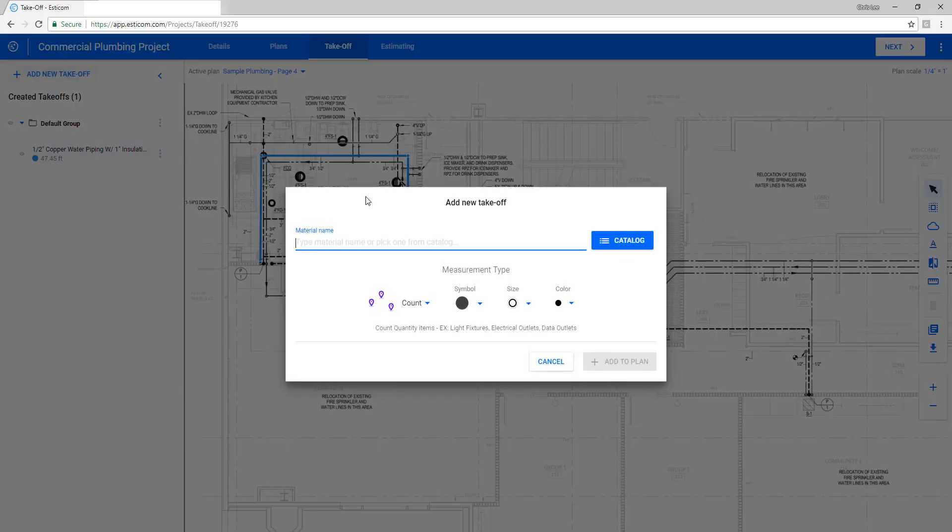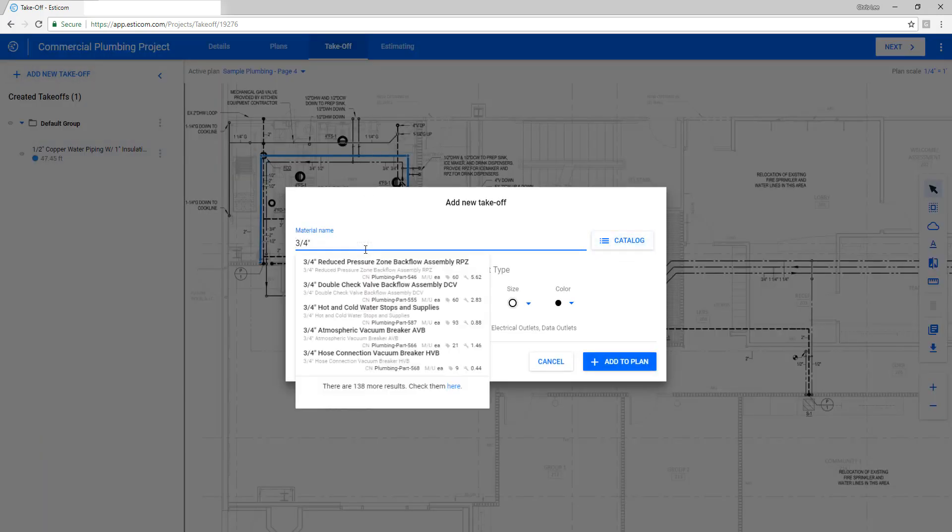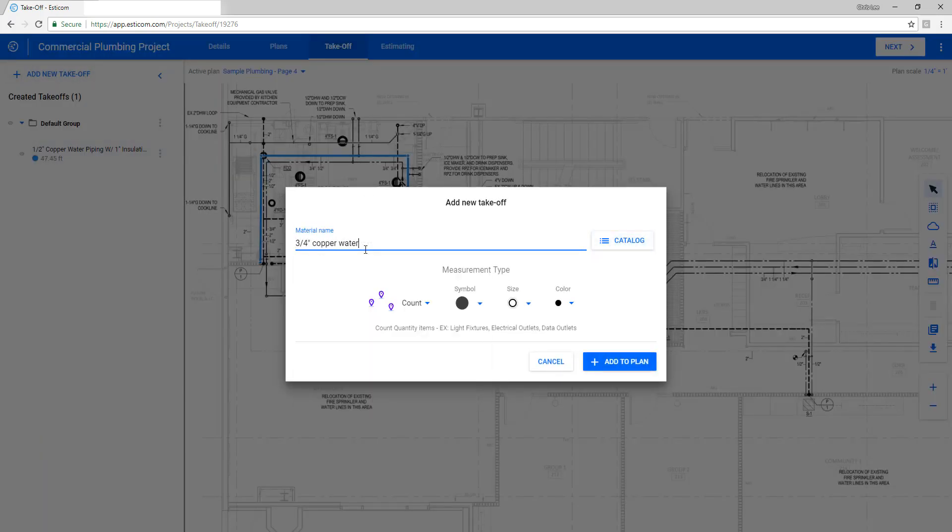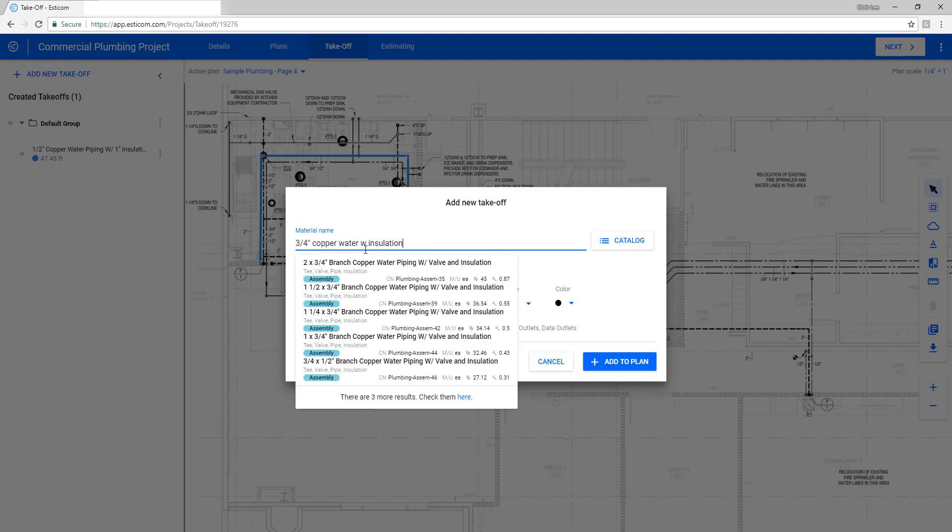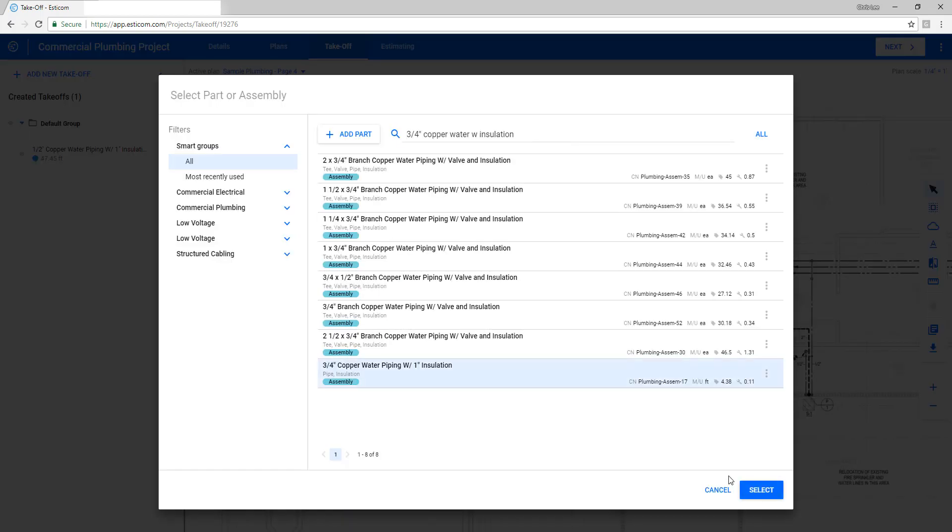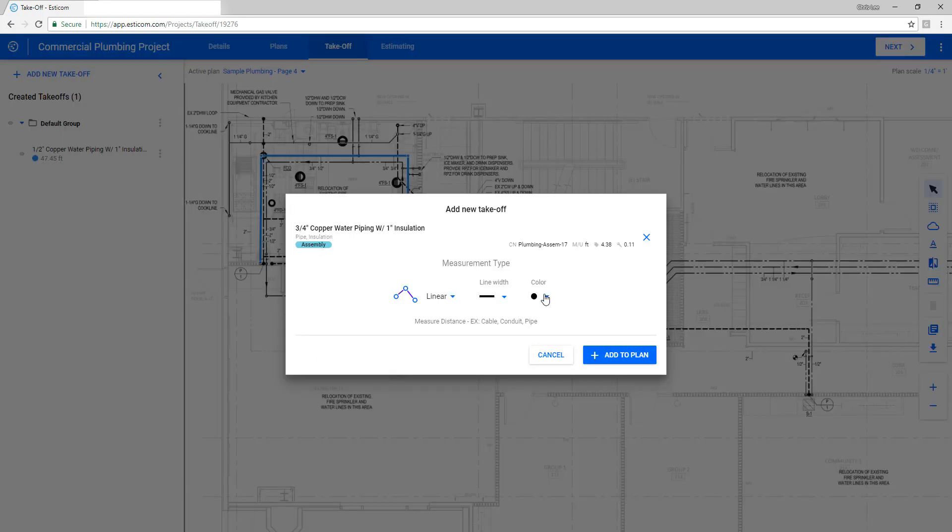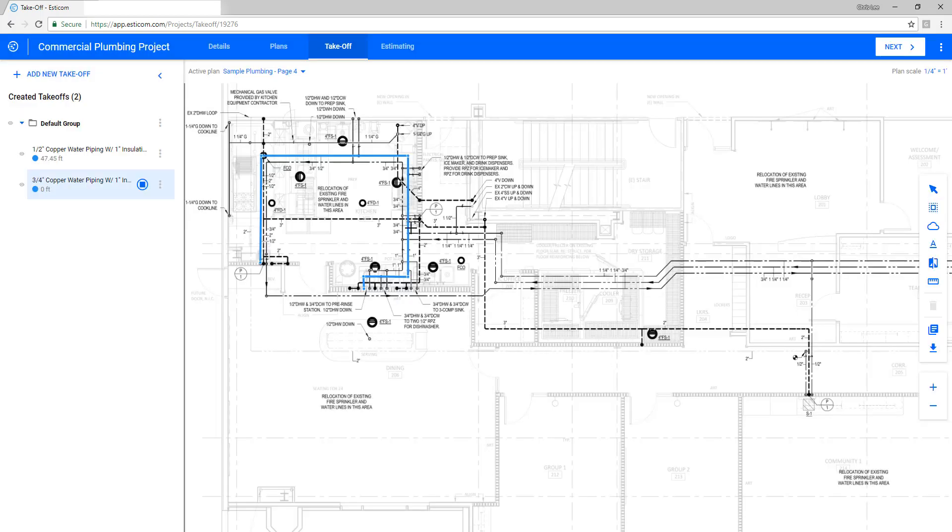Let's add a three-quarter inch copper water pipe to finish the rest of the cold water run as depicted on the drawing. Again, we'll select the appropriate properties, and when we click add to plan, the takeoff is ready to begin measuring the length of our pipe.